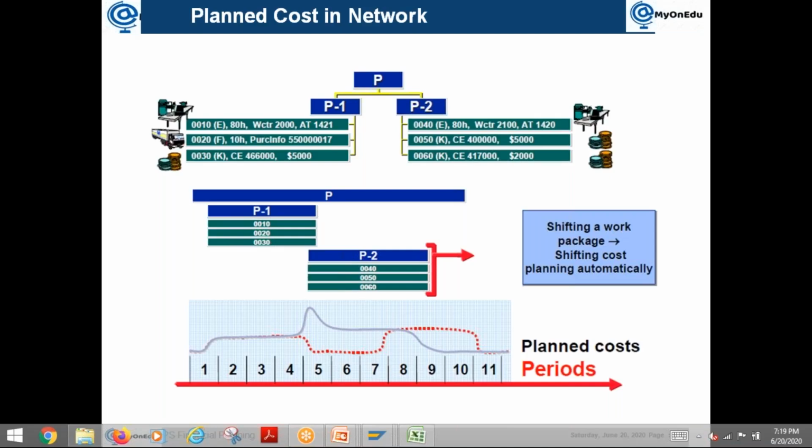In that span of time, you have a list of resources, and each resource is linked with a cost. For example, a material has a cost, right? Or if you plan manpower through an activity type, that has a cost associated with it. The system automatically picks from that, calculates it, and shows it as the total planned cost for that period.